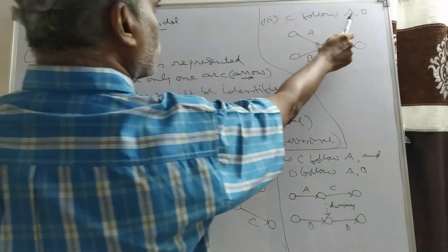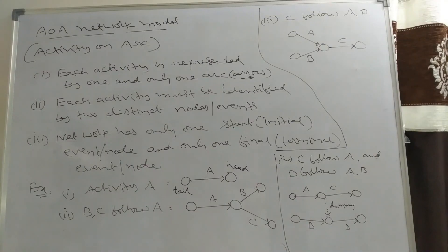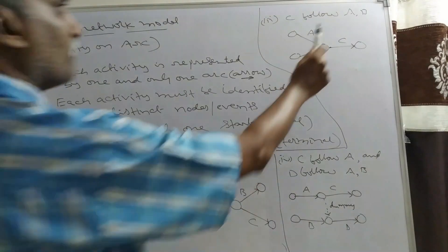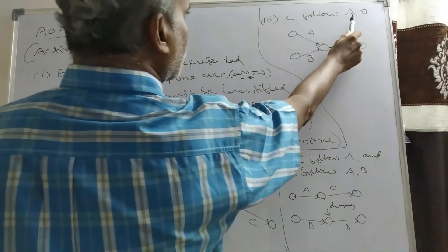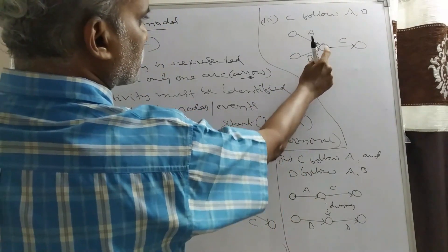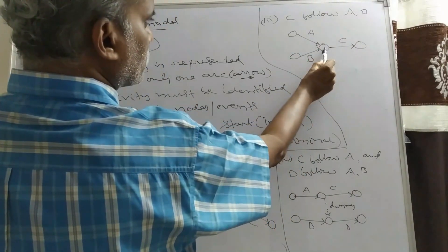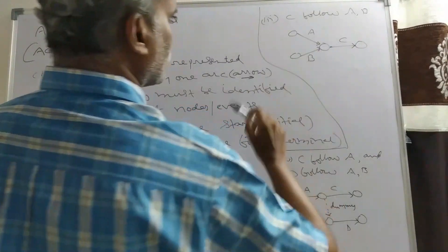Third example: C follows A and B, meaning after completion of both A and B, C starts. Draw activities A and B; one node represents the completion of both A and B. From that node, C starts.